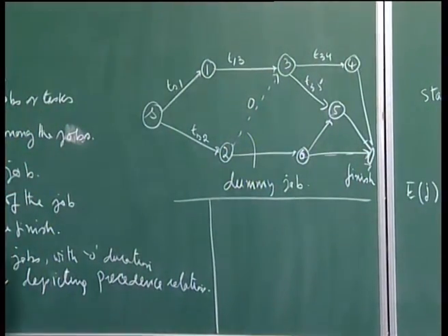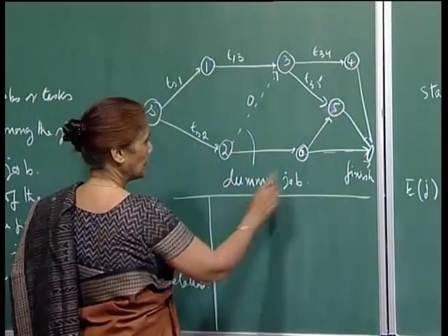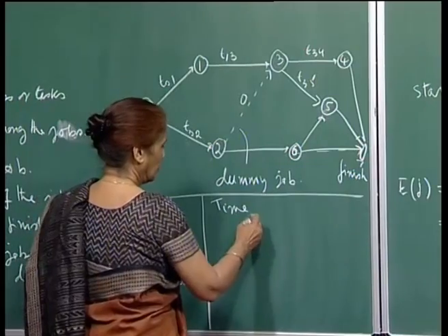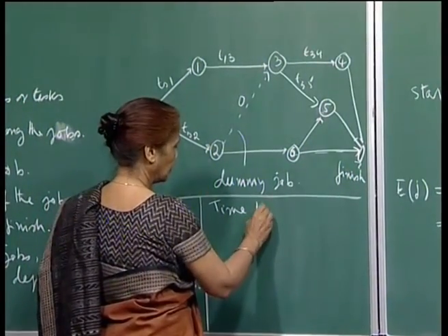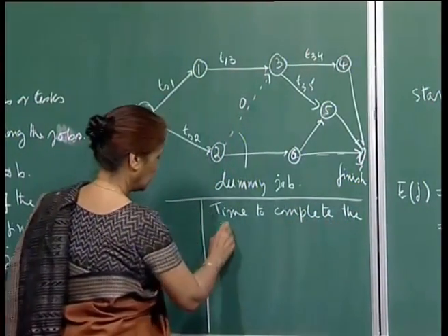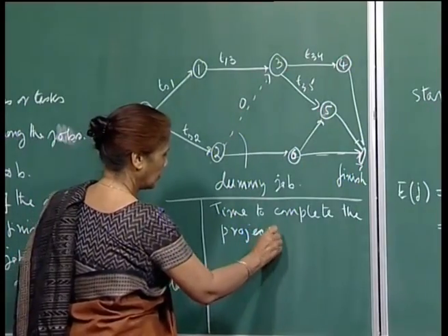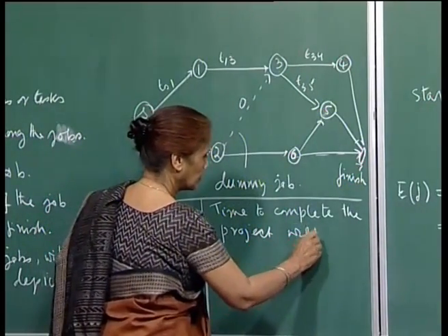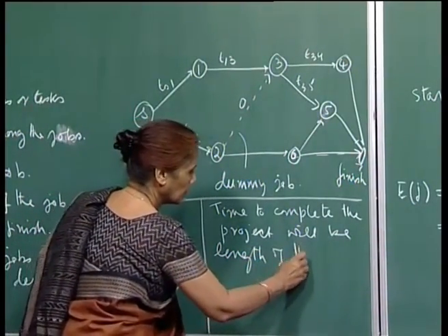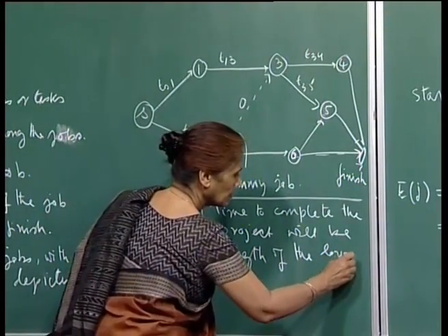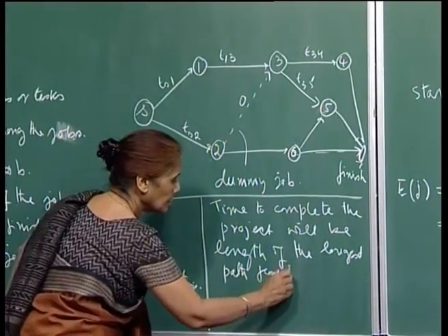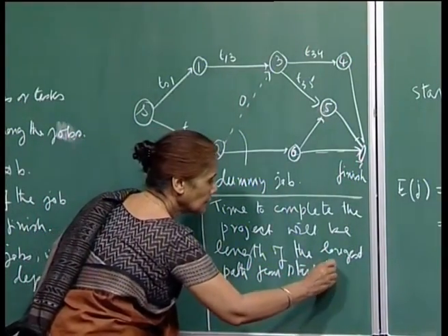So, when you reach t, the time to complete the project will be the length of the longest path from start to finish.